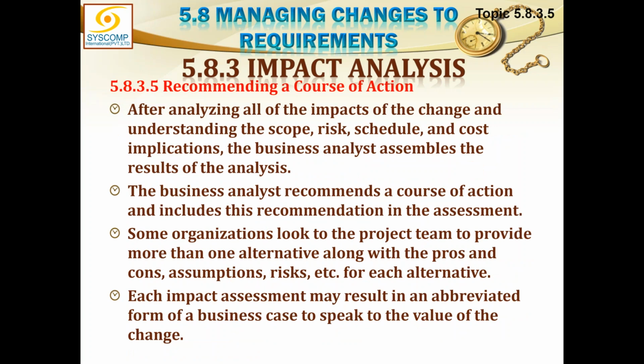After analyzing, this is the last point, recommending a course of action. After analyzing all the impacts of change and understanding the scope, risk, schedule, cost, implications, the business analyst assembles the results of the analysis. The business analyst recommends the most suitable course of action, and includes this recommendation in the assessment. Some organizations look to the project team to provide more than one alternative, along with the pros and cons, assumptions, risks, etc. for each alternative.